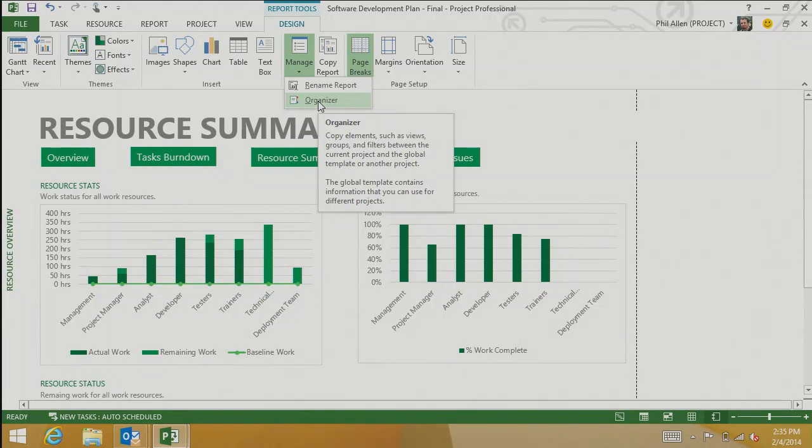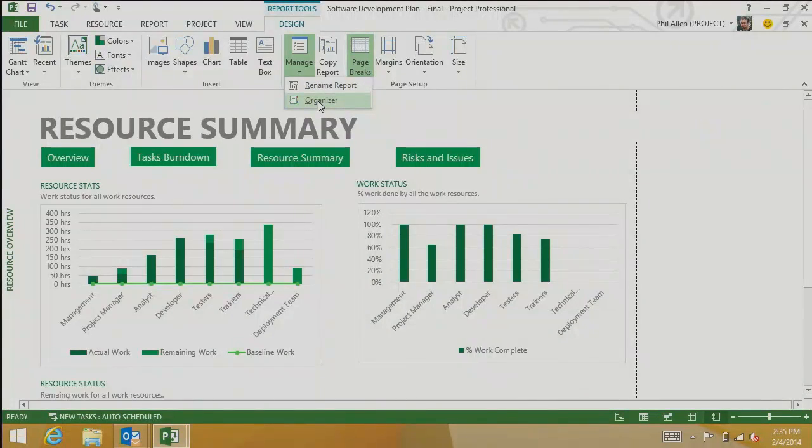So comes the end of the month now, and every month, the data that drives reports, and the process to keep that up to speed, is just Phil doing his job. Updating the project schedule to match what's happened in reality, and then moving tasks forward in future that haven't yet started, and then taking cut and paste from issues and risks and typing in some narrative. Print, that's his monthly report done. Or copy to PowerPoint, but we'll look at that. So that should save you a whole host of time. Do you think? Yes or no?